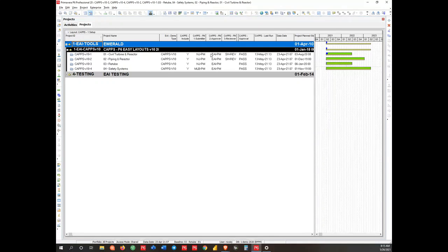So let's say you have a project manager who's going to do all the updating of these 4 projects. I can deploy it with a simple code at the project level. But if my updates are going to be divvied up perhaps by the phase of the project, so I might have an engineering lead doing the updates versus a construction manager, then this approach may not be good enough.